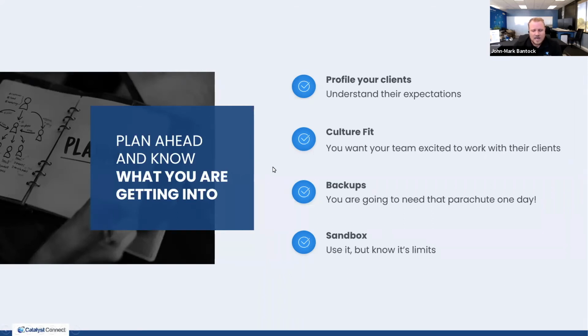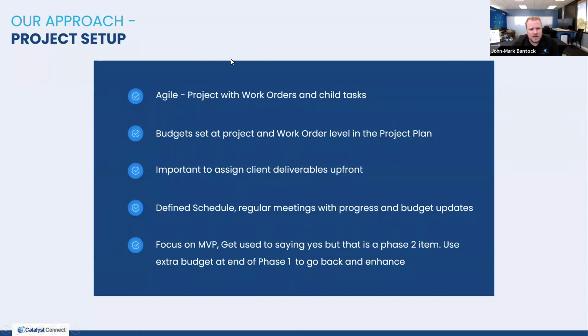So to that end, in setting up your projects, some of the key things that we like to do is make sure that we're not disrupting operations as it stands today. That may mean actually building a parallel Zoho system. If this is going to be a complete overhaul, we may just start a new Zoho One account and build things clean, especially if we're changing processes in a big way.